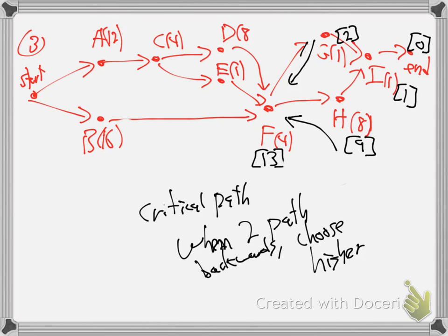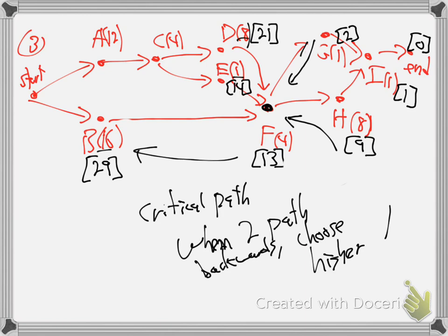Okay, so keep going. Now the 13, go back to the 16. Add 13, add 16, what's that, 29? But 13 also goes back to the 1, that'd be 14. 13 also goes up here to the 8, that'd be 21. Everybody see what I did? I went from this F back 3 different roads and just added 13 to 8 to 1 to 16. Good?